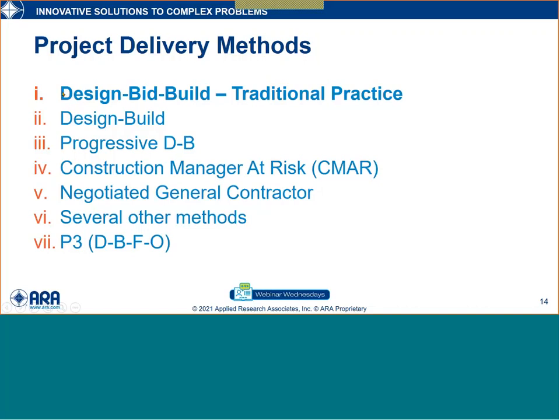Those references globally do not automatically translate when we use different alternative contract delivery methods. You can get yourself in quite a bit of trouble if you're not cognizant of that statement and you do due diligence to make sure that the transition for the reference, guideline, and code that you're applying is correctly in concert with the method of project delivery.